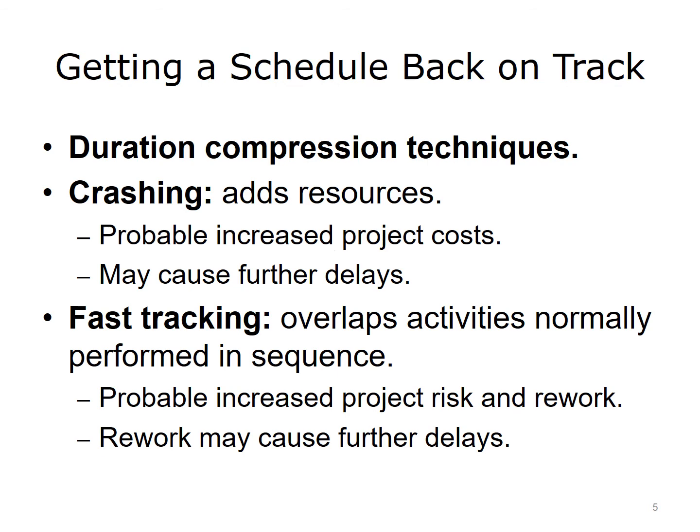A second compression technique is called fast tracking. Fast tracking overlaps activities that are normally performed in sequence. Typically, the schedule requires activities to complete in sequence because the following activity depends on the one before, so the parallel activities may cause confusion and require occasional rework.